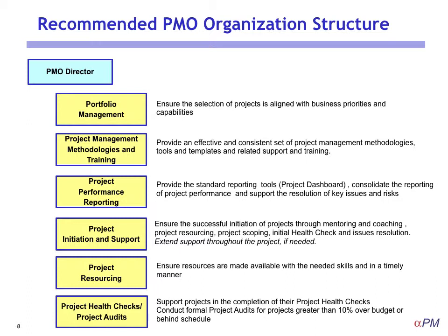So we want to support the projects. The PMO should be able to support projects in the completion of their health checks. And if a project runs into difficulty, let's say it's red flagged, it's running over budget, or it's running behind schedule, then the project health check, instead of just being done by the project manager, could be done with the participation of the PMO as a formal project audit to determine what are the issues and what needs to be done to get the project back on track.